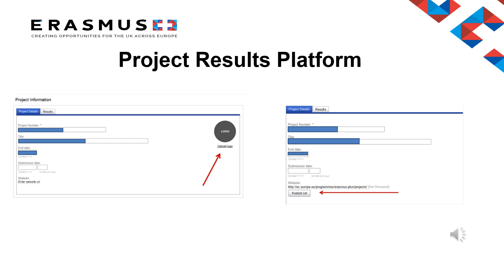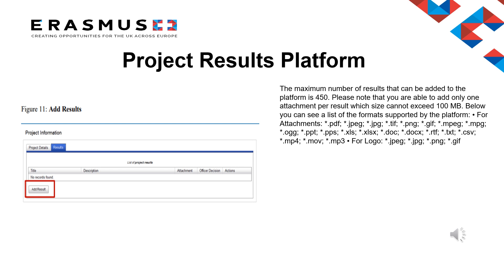You will be able to upload your project logo and website. Upload a logo and input a website dedicated to the project; if you don't have a separate website, add a dedicated page on your school website and provide that link. The project website is the only result that becomes publicly available during the lifetime of the project — as soon as you click the Publish URL button, the website will be published in your project card. All other results, including the project logo, will be published after being reviewed by your project officer during the final report assessment. For each result, you will need to create a separate entry.